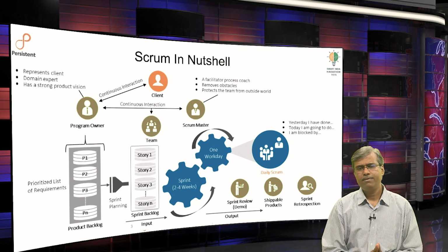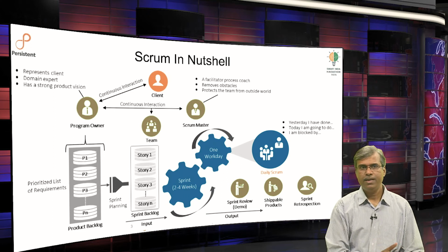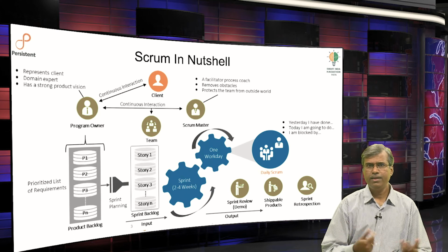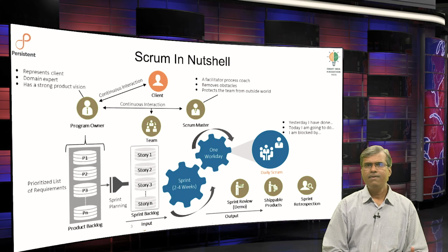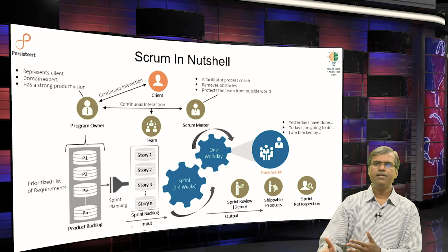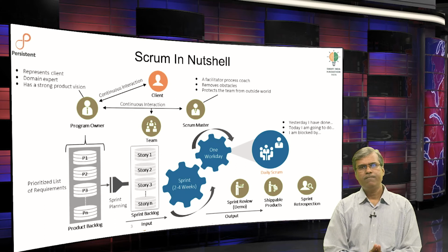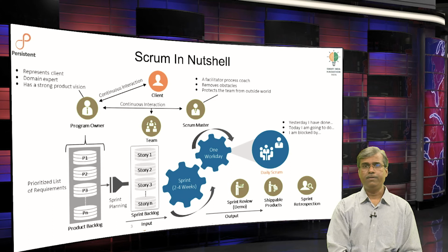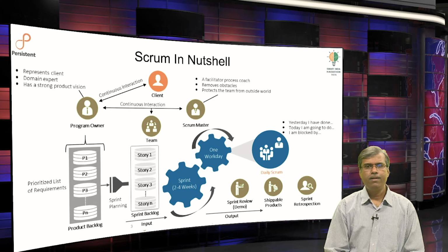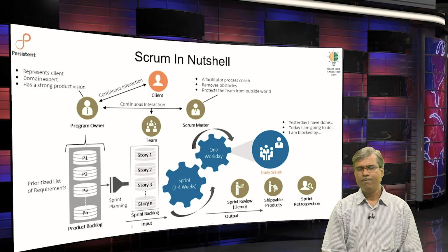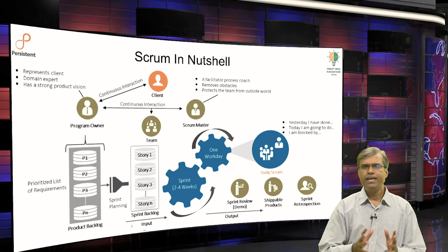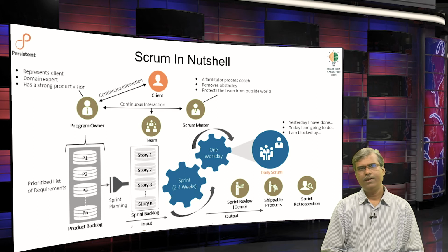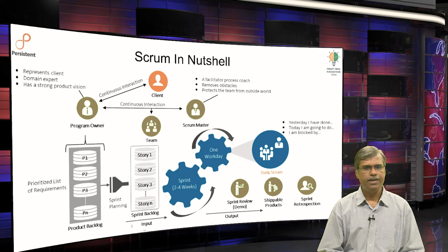And in case you do not have such data, you are starting your first sprint, it is obvious to assume something and then get started, or just leave it unanswered. After a couple of sprints, you will anyway know how many stories you could deliver in a given sprint, and the sprint is typically of a 2-week duration. Why 2 weeks? Agile does not dictate any particular time box as such, but 2 weeks is a generally agreed upon duration where an incremental software delivery could really make sense for end users, right.